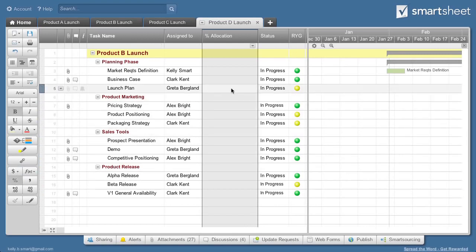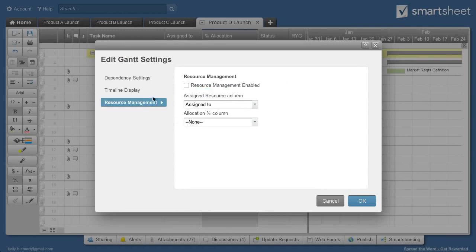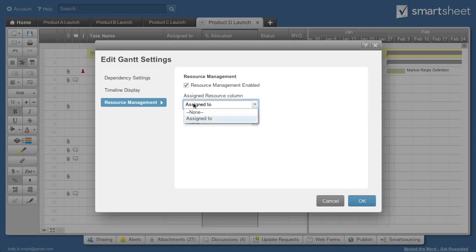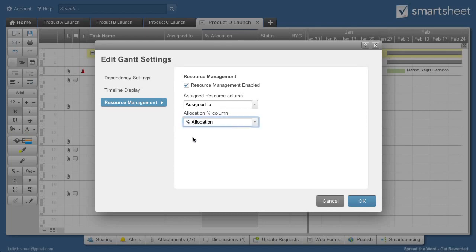Next, click on the Gantt Settings icon and verify that dependencies are enabled. Then, enable resource management and select the column that contains your resources, as well as your Allocation Percent column.